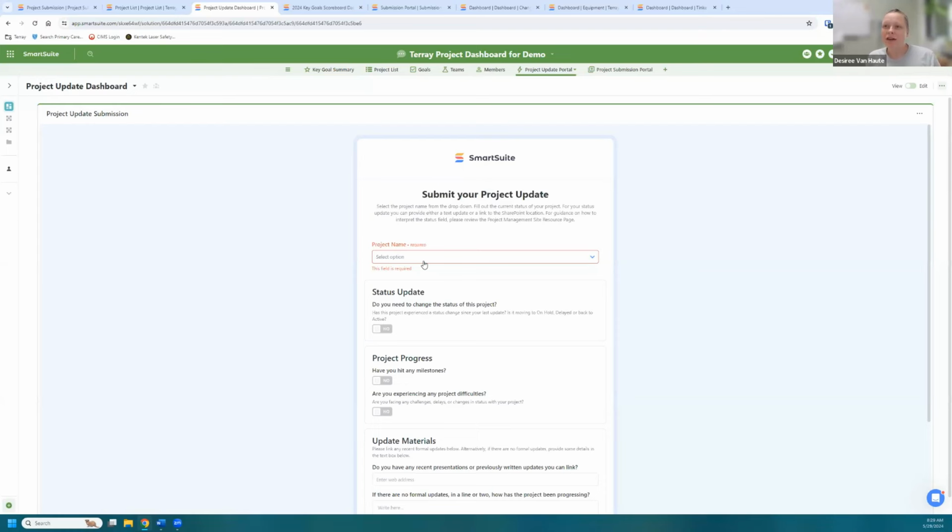I would say that for both the updates and the closeout that we're rolling out, both of them started with me collecting those updates manually to figure out exactly what questions we needed to ask the team. So I did the initial legwork of chasing everyone down and saying, sit with me and tell me about your project. What changes are you making? How are you struggling? What's going on? And from there, we took those updates and we made a form out of the questions that people were answering. And I did the manually running around for a very long time before I got the updates in a form I wanted.